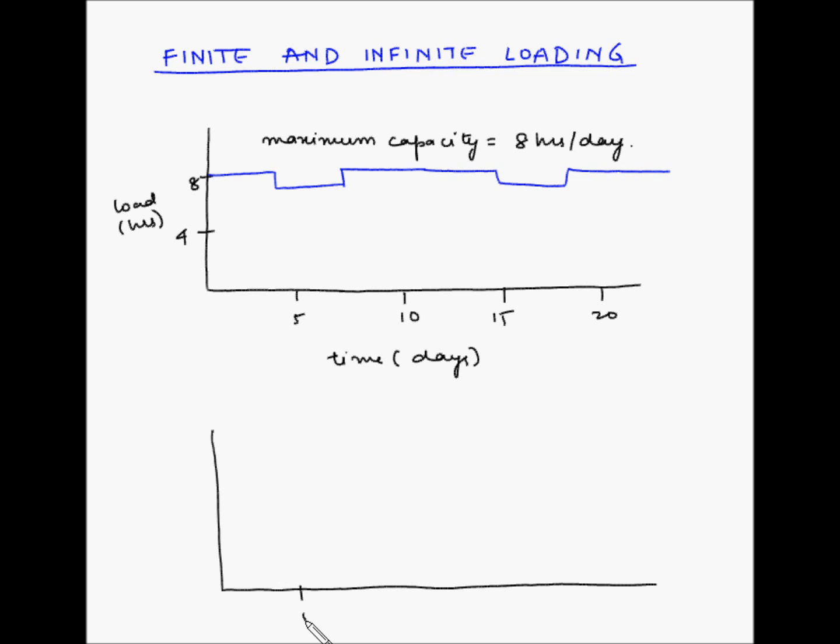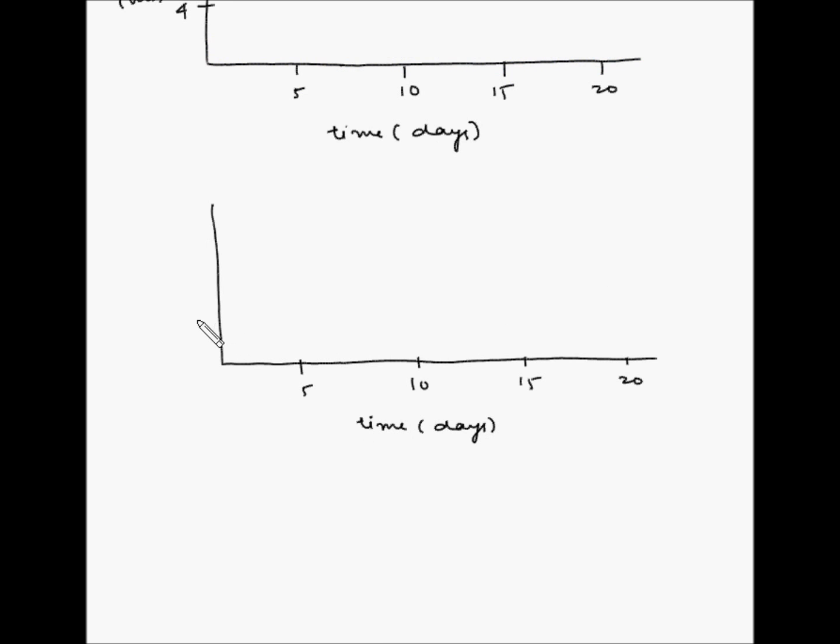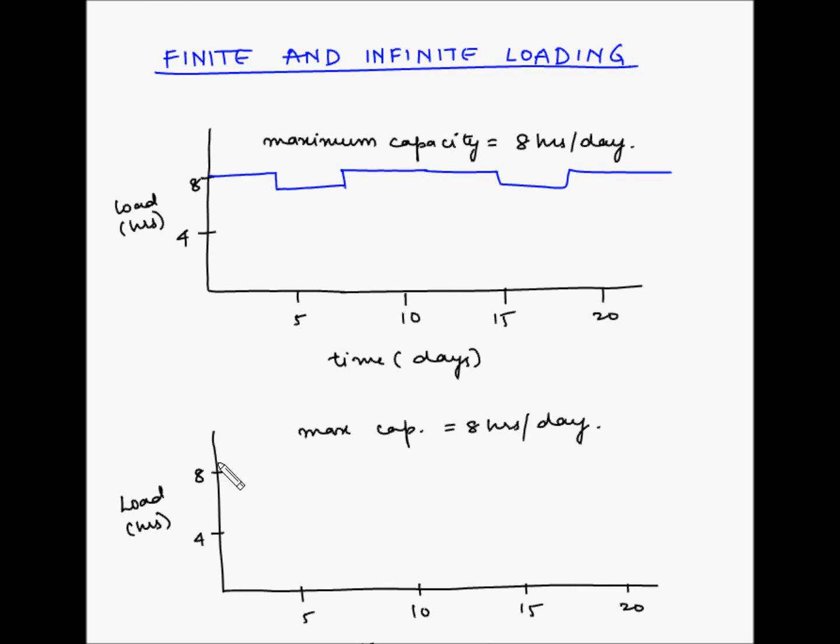On the x-axis we have time in days, and on the y-axis we have load. Again, the maximum capacity of the resource is eight hours per day. So the loading may appear something like this, which is more than the maximum capacity of eight hours per day. So the first Gantt chart is for finite loading.